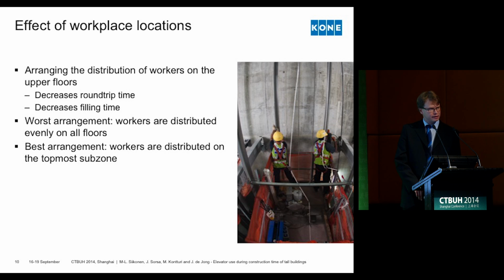And the best case here is that workers are arranged so that they are on the topmost floors of the served zone. And the worst arrangement is that they are distributed evenly on all floors.